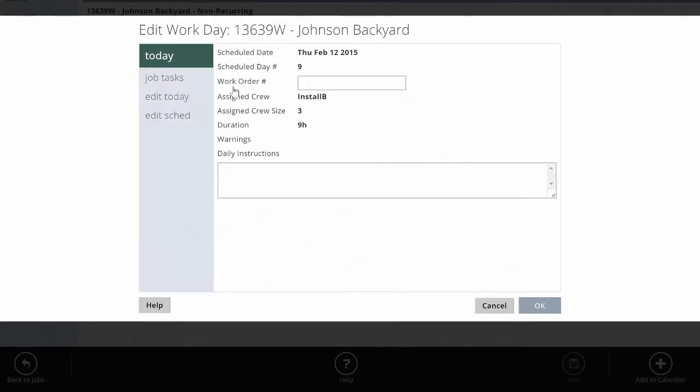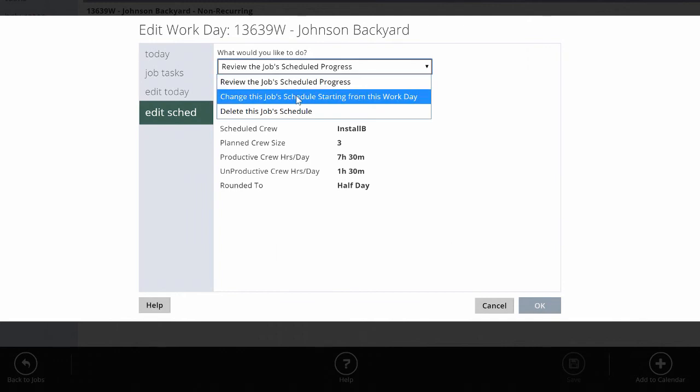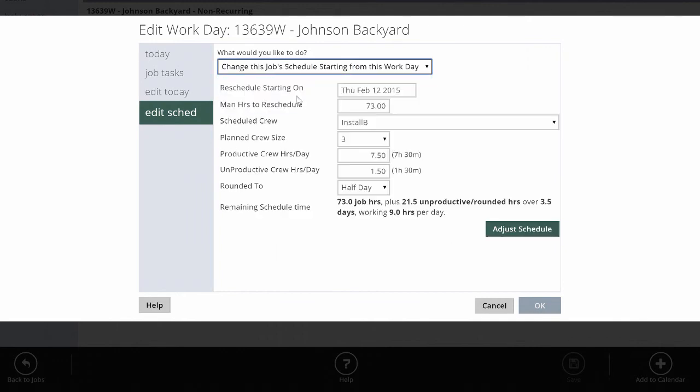When I go to edit schedule and I make changes to this schedule, it's going to show me how many man hours are left or should be left as of February 12th based on how I originally scheduled the job. So I would have so many man hours at the beginning of the job, and it knows that on February 12th, I should have about 73 left.